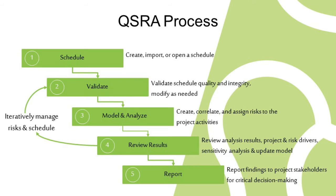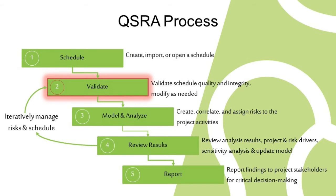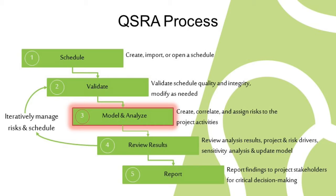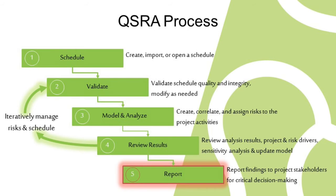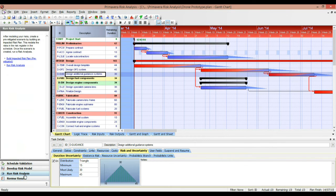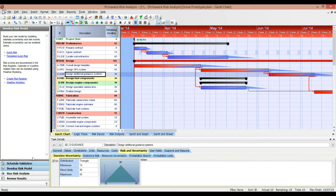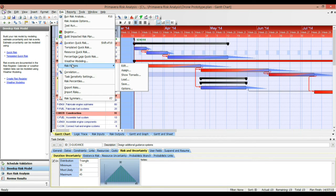Let's just quickly remind ourselves what the process is for doing a quantitative risk analysis. First of all, we need to get a schedule, then we need to validate it, then we need to create some risks, model and analyse the schedule, review the results, and ultimately report back. So let's remind ourselves how this looks in PertMaster. On the left-hand side, you'll see the process that you need to go through, but this isn't really linked to what you see in the tool itself — it's just a guide to help you. Because PertMaster itself is really a scheduling tool, you have access to all of these features and functions all of the time.